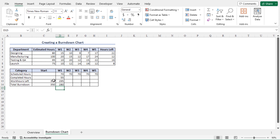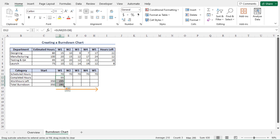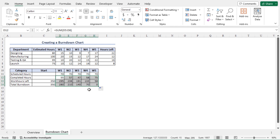To calculate these values for all the weeks, let me use the autofill feature. Select cells D12 to D14 and drag the fill handle all the way to cell H14. This completes our data preparation. You can see that at the end of the 5th week the total burndown amount is 0; however, the actual work hours left is 58, meaning there are 58 hours of work yet to be completed. So we couldn't meet the deadline.